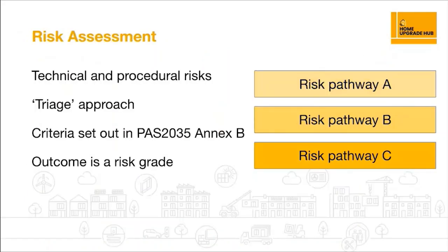So the risk assessment, this is a really important stage. All projects have to be triaged by the retrofit coordinator according to the level of project risk. And that's going to determine how much special expertise you need from an architect or similar. So this is about collecting more data to inform and evidence that decision.